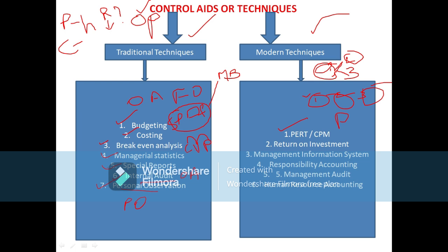The event with which the project begins is known as the start event. As I said, the first activity is the start event. For example, after the second and third activities there is also a fourth activity, and a fifth activity. This fifth activity will be the last activity. So there will be a starting point and an end event also. In between these two, there may be several different sequences from 1 to 5. In between there are many activities. Each of these sequences is known as a path.